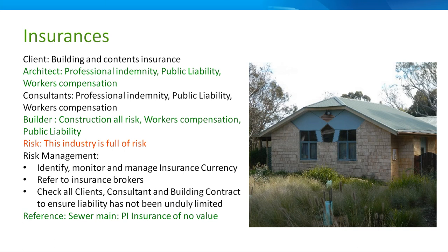So the short of it was, we had to redesign this one building. We had to redesign it as 2 buildings in 2 different locations at our cost. We then tried to sue the consultancy firm because they stuffed up. We asked them, they confirmed it, no, go ahead. But they were a really big consultancy firm, and they had 3 lawyers on their staff.